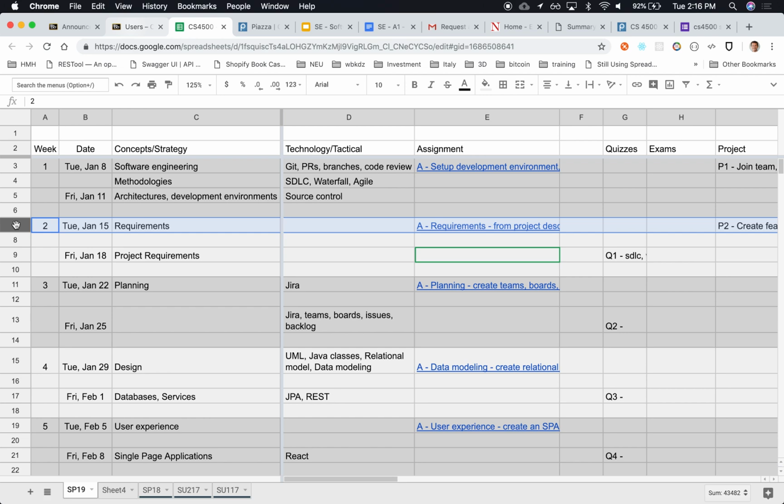From now on, every single assignment after this requirements assignment, you'll be required to do some requirements analysis, which is very common. In every sprint, we'll talk about sprints, there's a portion where the first part is understanding what the requirements are, documenting enough so that we all understand what it is that we're building, making some design, and then going off and building it.